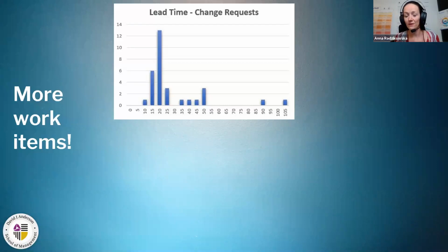The first one was change request. Every time we deliver something to our colleagues, they reviewed it and they gave us the feedback whether it's something what they expected to see or not. And as I mentioned at the beginning, we received a lot of feedback that we need to change something in the work that we have already delivered. These change requests were failure demands, and we really didn't like it because it disturbed our process. But yeah, it happened and we had to solve it. So this was the second, except for the new build, work item type, which was change request.